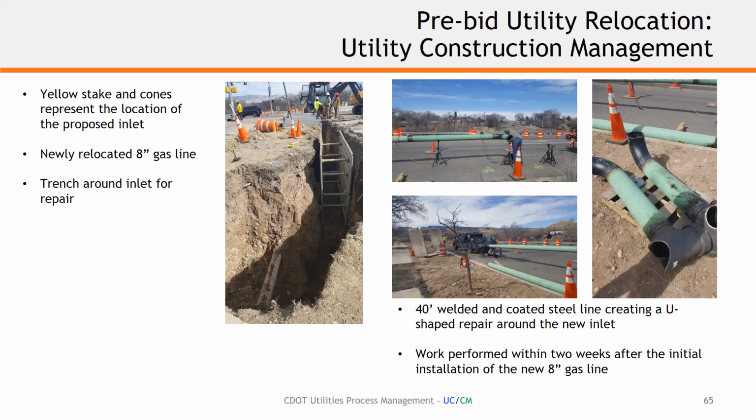But like you said, there's always a miscommunication, I believe, from the office staff to the construction staff. Oh, absolutely. I've been out in the field more often than not, and I've asked contractors, where are your plans, and they'll pull out the utility plans the utility company provided. Well, where are your CDOT plans? Because we've added that information to our utility plans, and that was supposed to be provided to you when you go to construction. We gave that to your office staff, and lo and behold, it never made it to them. Or like you said, it was in the permit, but still never made it to the construction team that's working for the utilities.